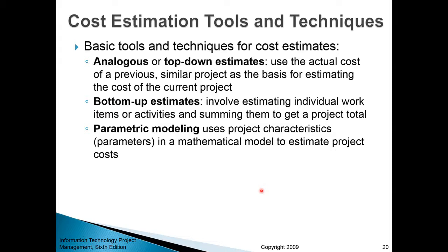Let's say those parameters will reflect the number of team members working on your project, the number of licenses that you're going to purchase. Then you can also enter the number of users. Then you can enter some risk factors, and based on all those parameters, the model will give you certain estimates about future cost. So you can try different optimistic, pessimistic scenarios to get a range of cost estimates, saying, well, the cost will be somewhere between X1 and X2. So this is the parametric modeling approach.